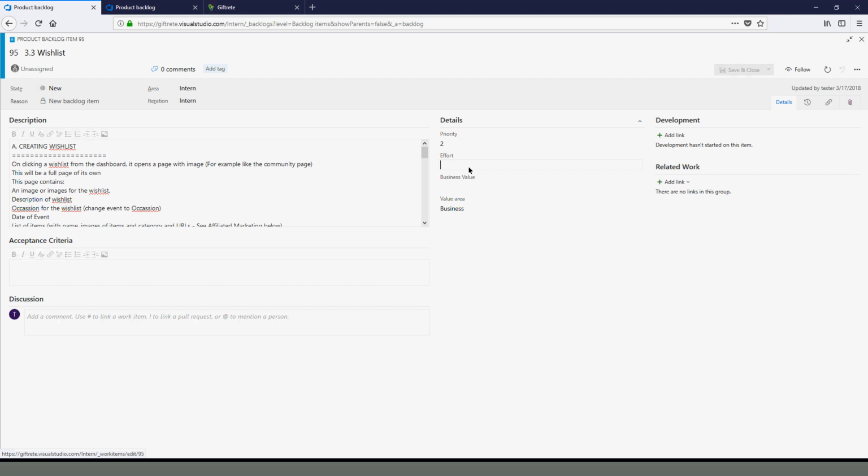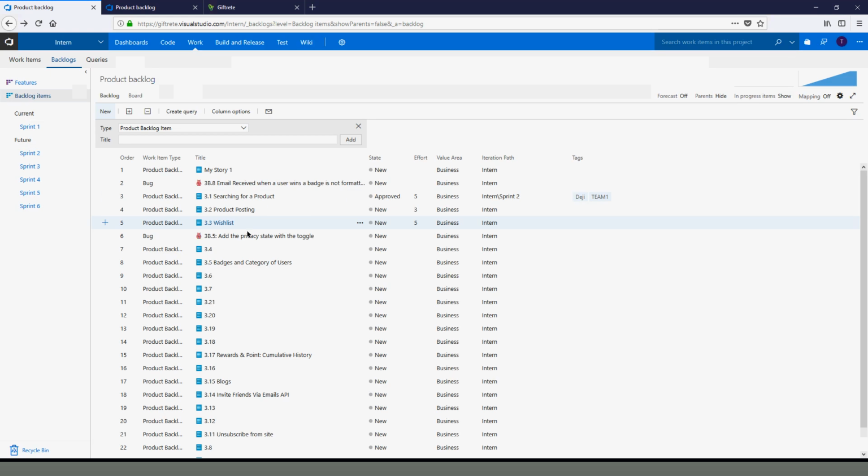So from there, you know what each one did at the end of the sprint. If Gloria, sorry, I mentioned Gloria, the team lead of one, was able to do 1 and 3.1 and 3.3, and that's 10 points, and Deji was only able to do 3.2, that means in that sprint, I was only able to do 3 points. So that's how you measure velocity. Another thing they measure is how you cope. Last sprint you were able to do 10 points. This sprint you only did 5 points. So they measure velocity based on that.